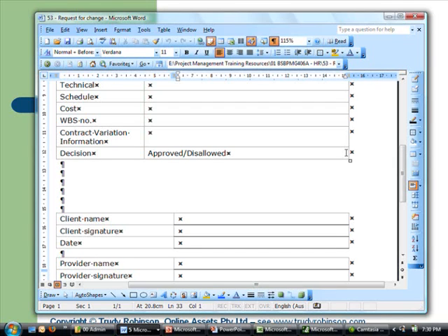So what can we do if there's a piece of equipment that is delayed to be delivered to the site, for example? Okay, well, if somebody hasn't performed or hasn't delivered what they should have delivered, that's not really a request for change. That would be you managing that under a contractual obligation. So if they've got a contract to deliver things in a certain time frame, in that contract you would have a delivery time, and you might have a back charge clause. So if you don't do this, then we're going to charge you this every day until you do.